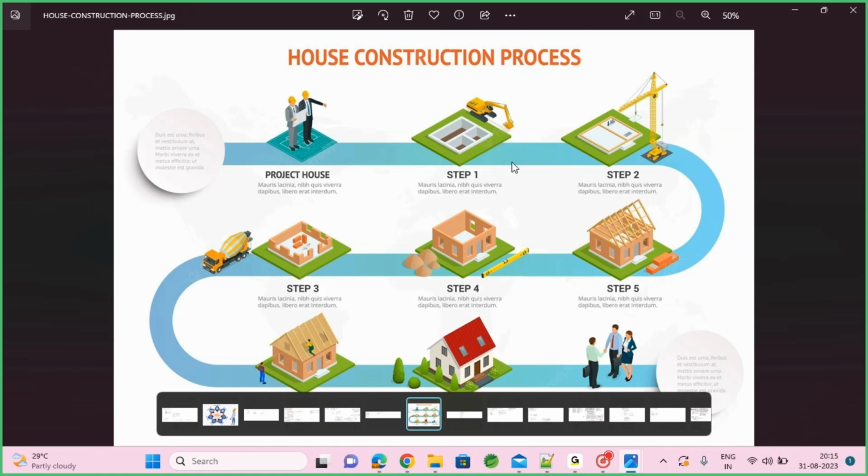So usually the charge for each lorry is 4,000 rupees. If that could come directly inside my compound, it could put the dust there and we could level it. But instead, as the gate entry is very small, they put all the dust outside, and I deployed people for each truck. They charged 8,000. Material cost is 4,000, and to shift that just inside the gate, I invested 8,000. Like that, for 3 or 4 trucks, I unnecessarily spent 50,000 rupees because of improper planning.